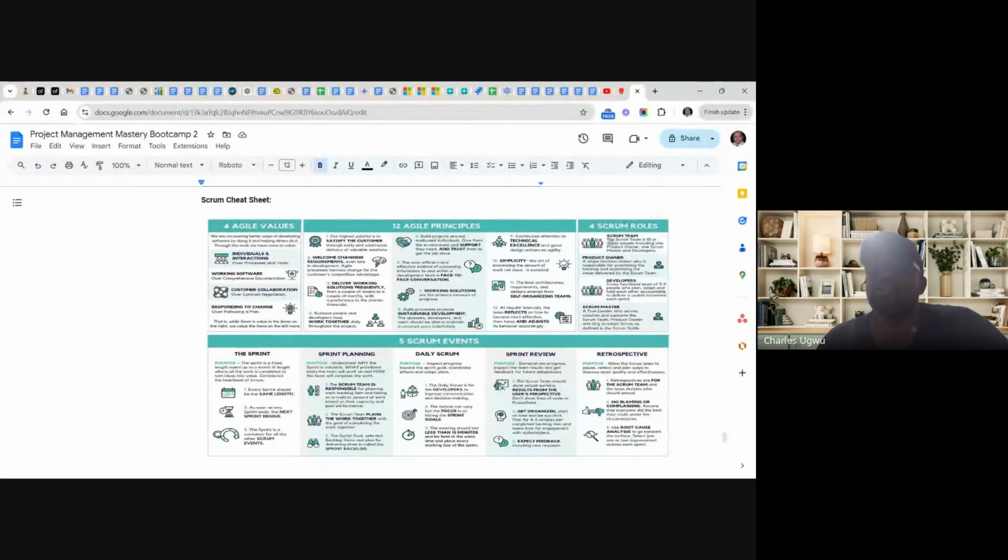Everybody is one. That is what I mean, that the Scrum team is one. When you talk about Scrum, it is one team of 10 or fewer people, including the product owner, the Scrum master and the developers. So a team of 10 people is regarded as one body. They work as a team. We don't work as individuals. That's why, when we talk about rules, the Scrum team is number 1. That is team building.